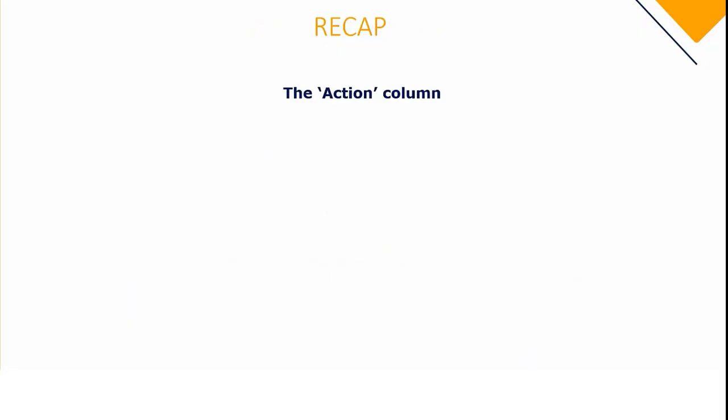What have we learned? After we've aligned the bill and the addendum items, the first information to pay attention to is in the actions column. The information in this column will give us direction as to what changes or new information will be inserted into the bill from the addendum as soon as we strike the update button.